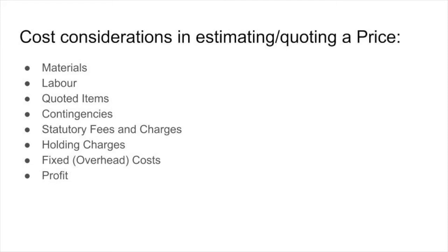You also need to factor in, okay, so those are your expenses. You've got your variable cost expenses, your fixed cost expenses. Then you also want to consider, how much profit do you want to make on something? Let's assume that you want a 30% profit. So whatever your costs are, you add up all of these things, and you can come up with a cost, let's say, of $1,000. So the cost of painting the rooms that I asked you to paint is $1,000. That's your cost. You're going to say, well, I want a 30% return.